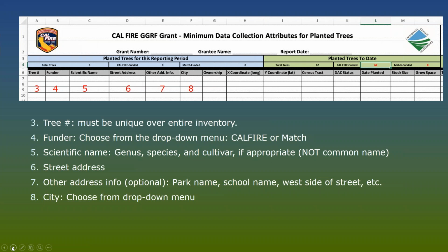A lot of people are choosing maybe an abbreviation that represents the area that the tree is being planted in, and then a number, or you could just carefully use numbers but make sure that they don't repeat. If for some reason in the future you go back and delete a tree, say you delete tree number 673, please do not renumber them all, so that just 673 is missing, and then you can say to me, I deleted this tree.